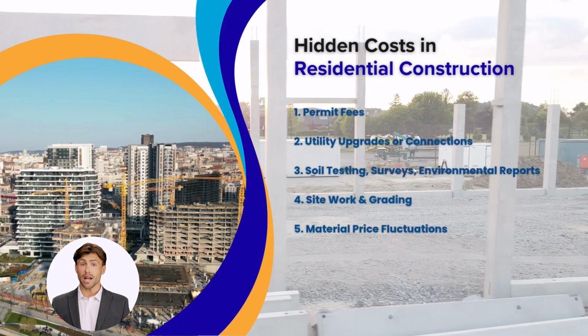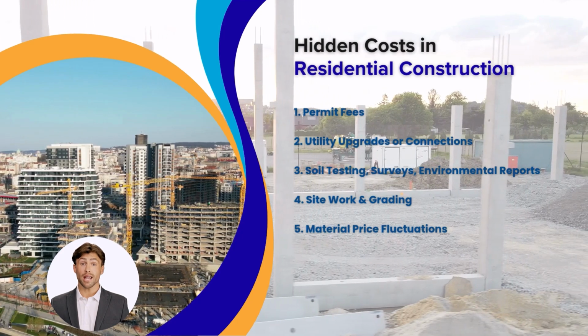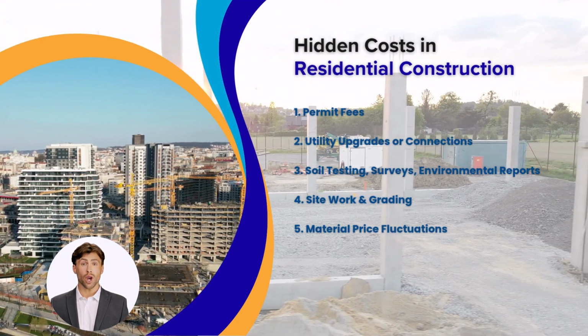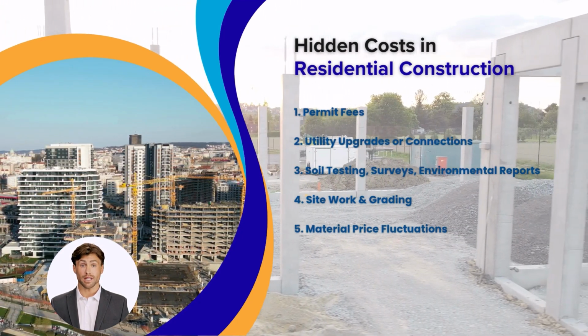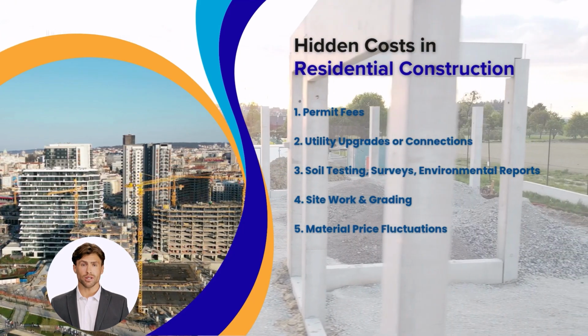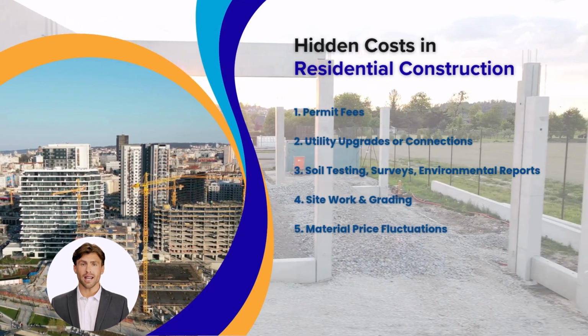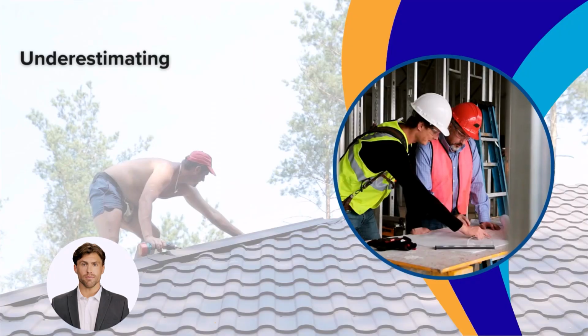4. Site work and grading, earth moving, excavation, retaining walls, especially on sloped blocks, can balloon unexpectedly. 5. Material price fluctuations, driven by inflation, supply shortages, or international freight surcharges.